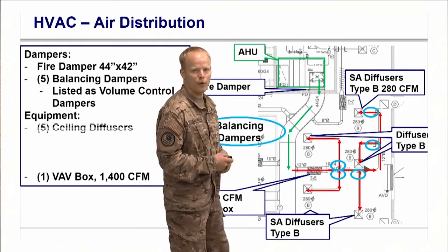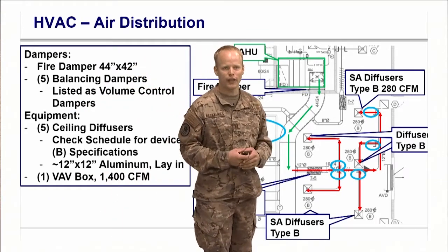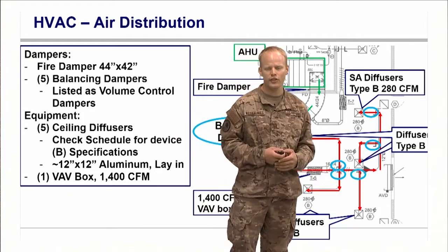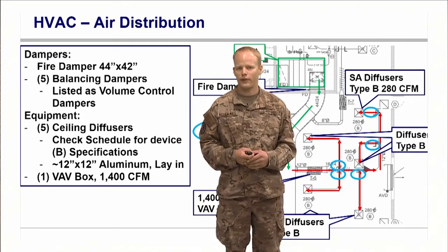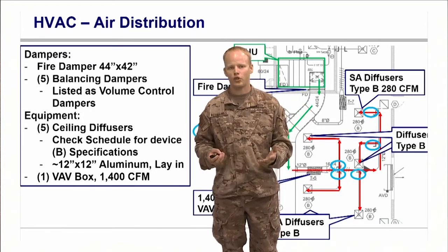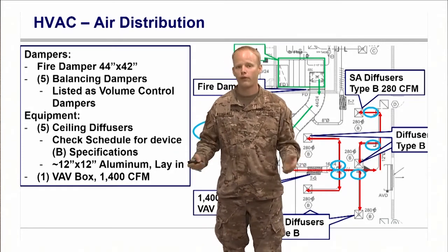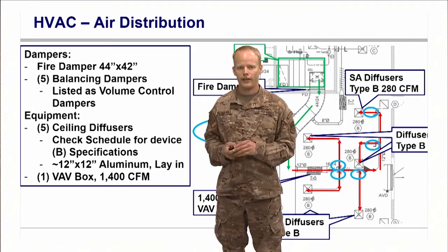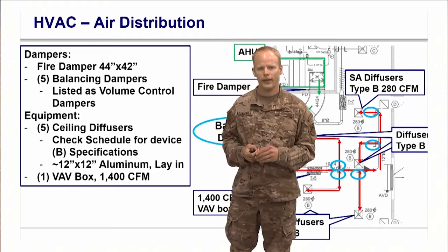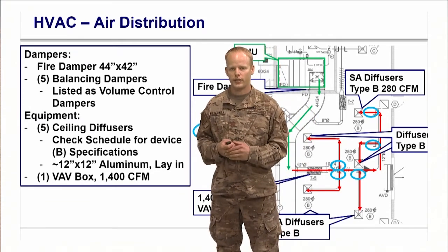Well, I know how many diffusers we have here. So I can go through and count the ceiling diffusers. You're going to check to see what the specifications are of these. These could be 12 inch by 12 inch. It could be 24 inch by 24 inch. There's a lot of different flavors of diffusers out there, so check your schedules to see what they are.